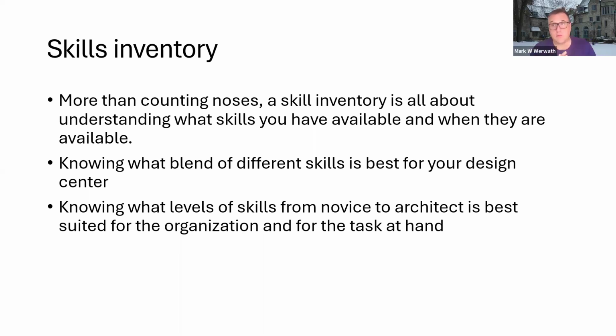So you have to have a very good sense of what projects they're already committed to, what projects are coming up, what other commitments you might have for those folks, whether that's personal time off, vacation time, holiday time, training time, or time to revamp an old product, or work on what we call MOL, maintenance of the line, which in some organizations can be anywhere from 20% on up. MOL activities are really activities to maintain older products, to keep them functioning in the factory so that you can continue to work on new products in parallel.